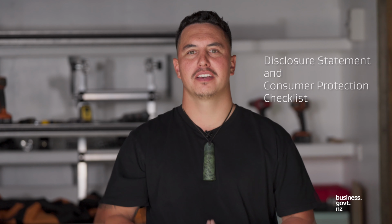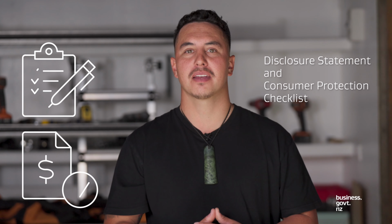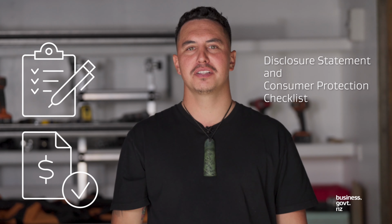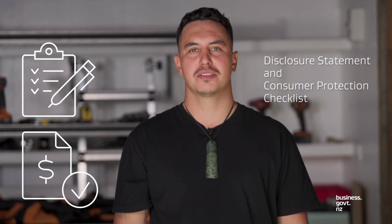If your residential quote is more than $30,000, including GST, you must have a building contract. To do this, firstly, give your client a disclosure statement and a consumer protection checklist before you sign the contract. You can find this on the building.govt.nz website, where we've linked these below. Second, you need to have a building contract, agreed and signed with the client. This helps protect both you and your client and keeps everyone on the same page about who's doing what, at what costs, and what will happen if the job changes or things go wrong.